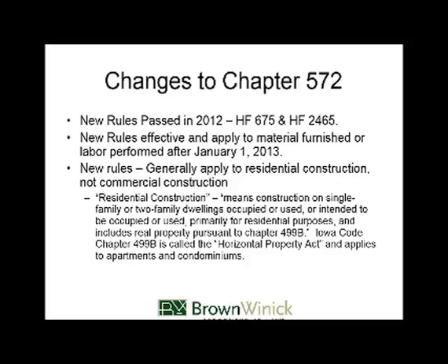Now, the big thing about the rules to keep in mind is that they generally apply to residential construction, not commercial construction. That's a distinction that was made clear in the rules, and some of the parties who were lobbying for the bill got the exclusion of commercial construction. So for the most part, they apply to residential construction. That is a definition that I've included for you here, and it means construction of single-family or two-family dwellings occupied or used or intended to be occupied or used primarily for residential purposes, and includes real property pursuant to Chapter 499B. 499B is the Horizontal Property Act that talks about apartments and condominiums.